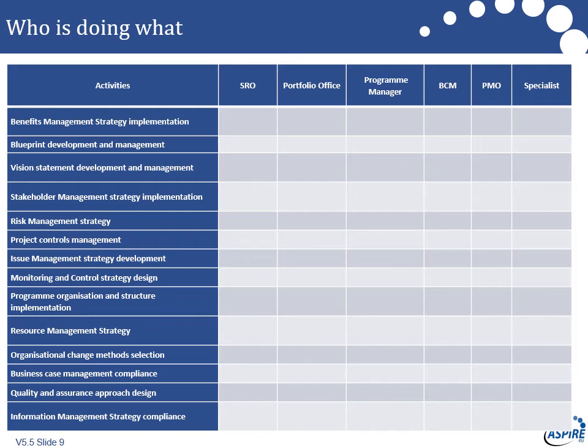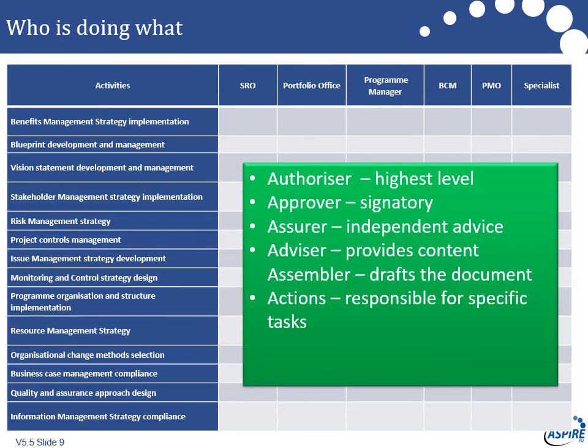We were looking at one recently, and what we noticed was they quite often put accountability and responsibility with the same person, which is hugely bad practice, because the whole point of accountability is they provide oversight and checking of what the responsible person does. So we came up with one a few years ago that I think is worth sharing with you. In this one, we've come up with 6 roles, and they all begin with A, so the 6 A's.